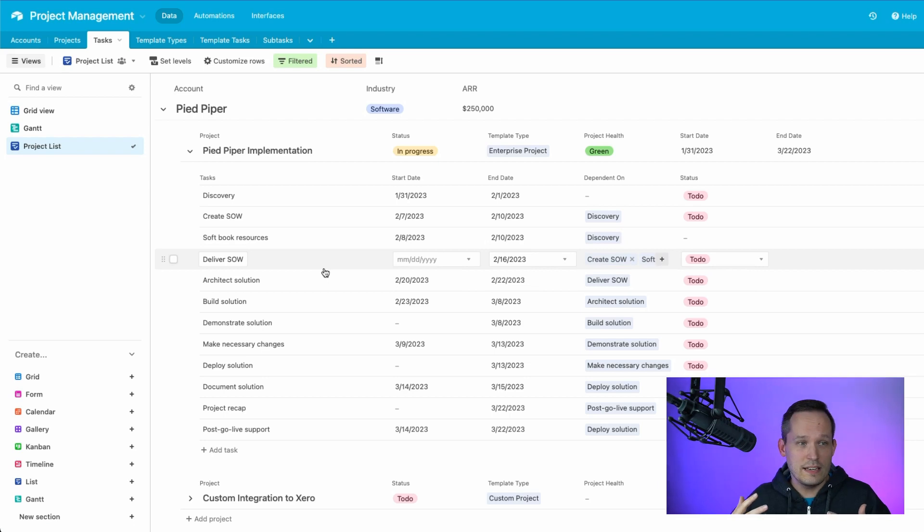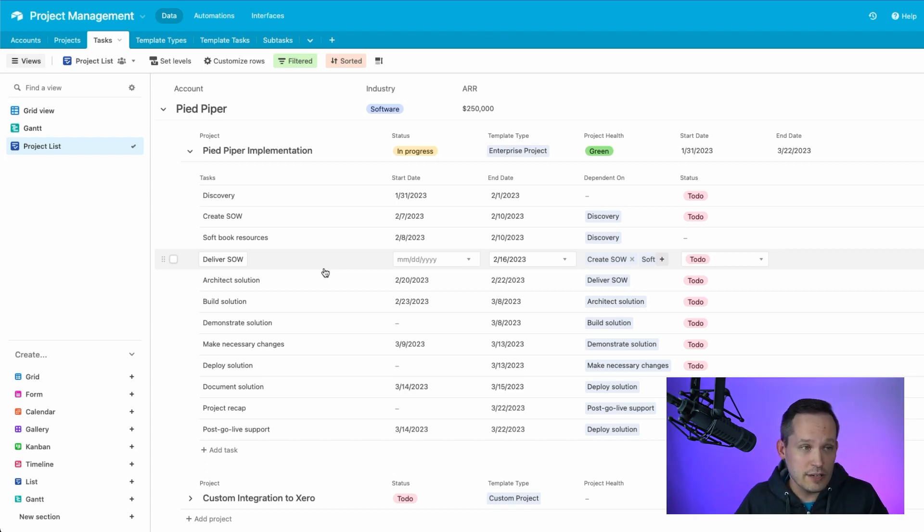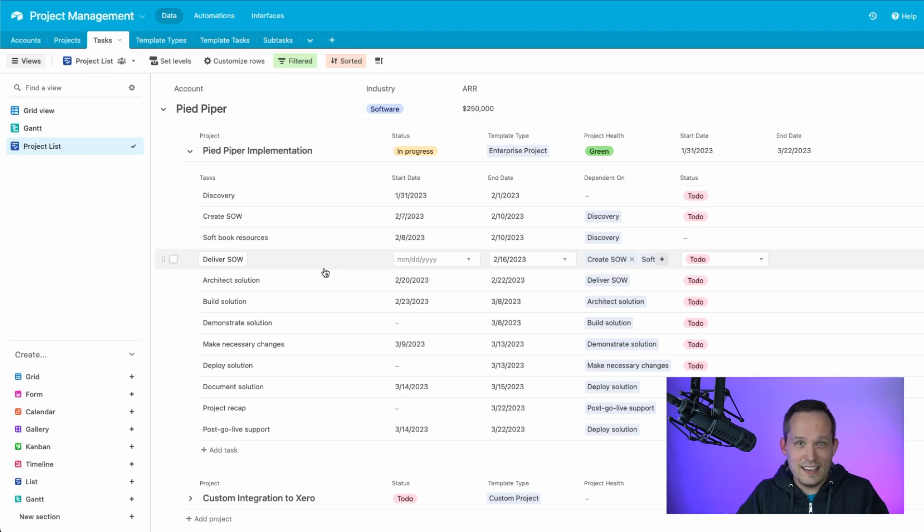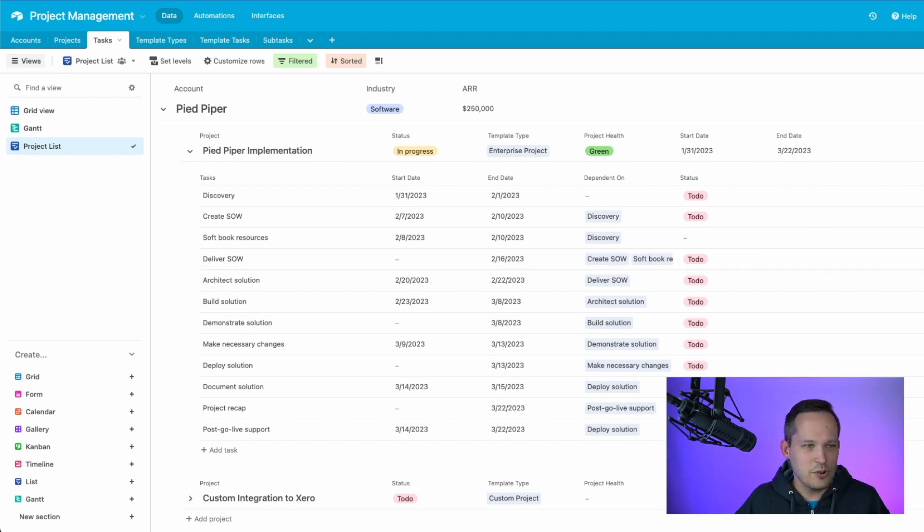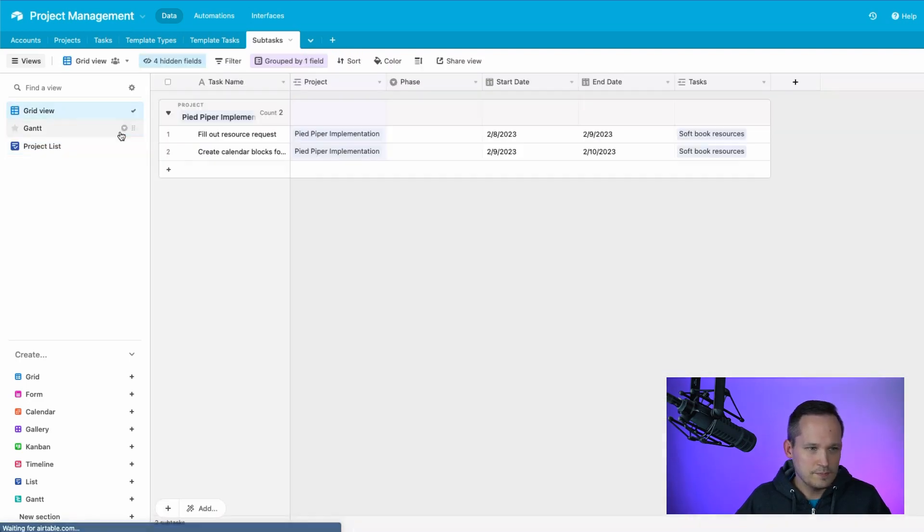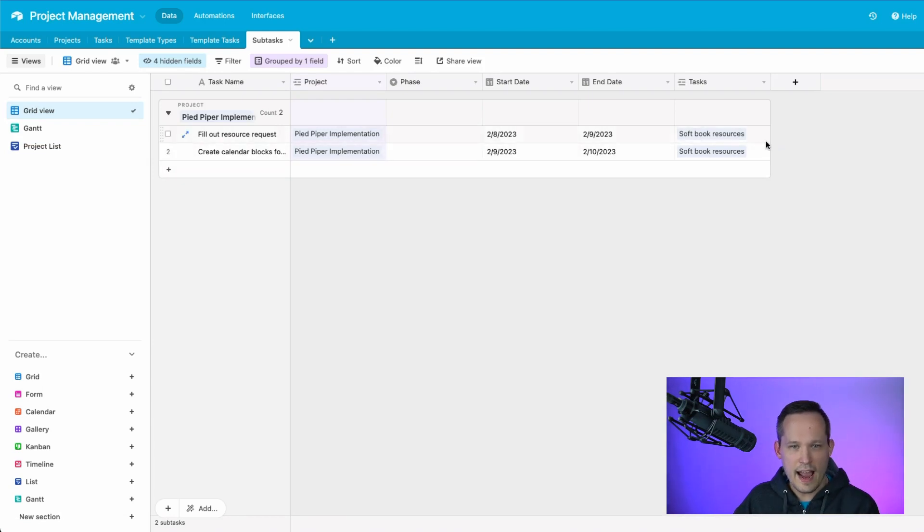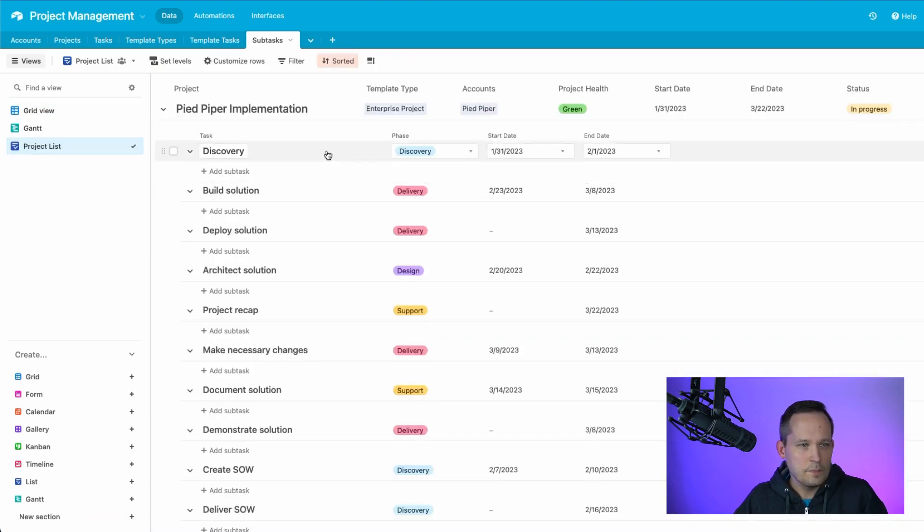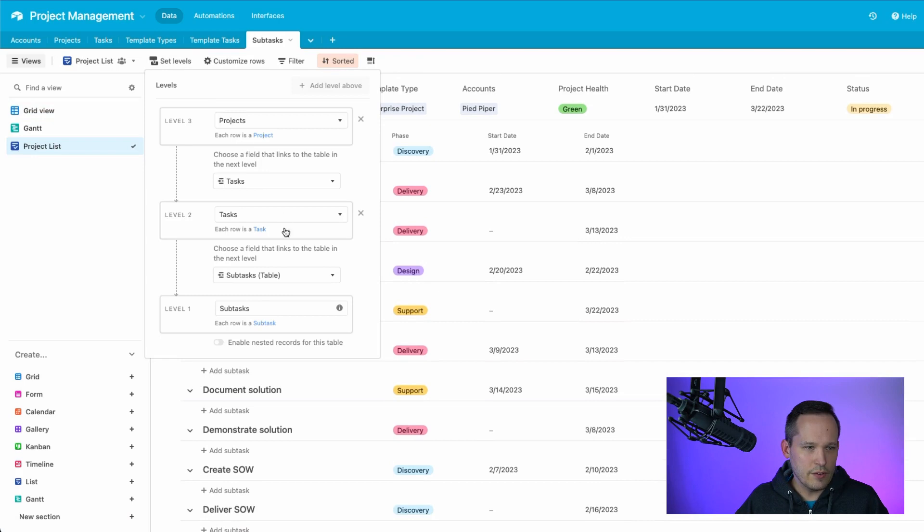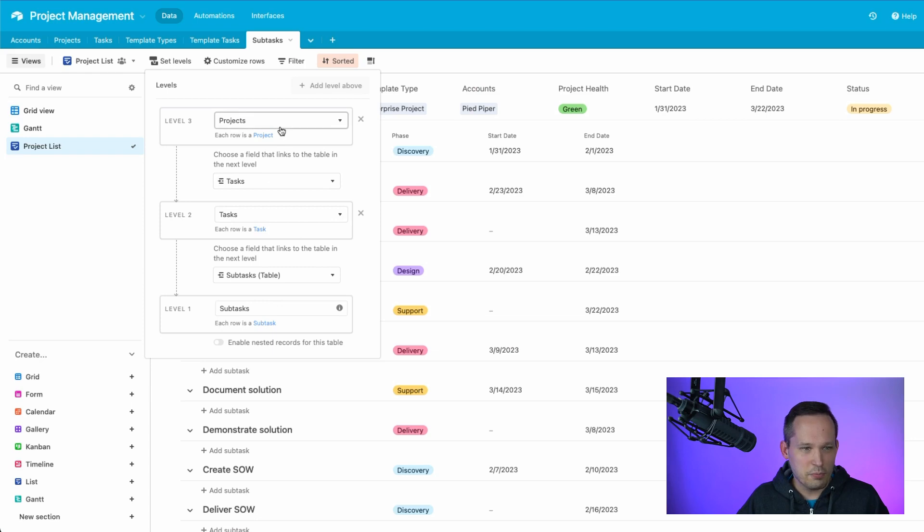Now, of course, the other possibility is, hey, Dan, why don't we just create a subtasks table that's different than tasks? This is not my preferred solution for a couple of reasons. One is because inherently a task and a subtask, it's the same thing. I mean, you've got start and end dates, you've got a status, you've got a description. It seems really silly from a database perspective to create two different tables. But what the heck? Let's give it a try, right? So I created a subtasks table and I just added my subtasks to it and I added a lookup to the parent task. That makes sense. And then I was able to create a new list view again where this time, let me show you the levels. I've got subtask as the base level. Notice I can't use the nested parts anymore because it's not nested. This is its own object here. And then we've got tasks and then we have projects.